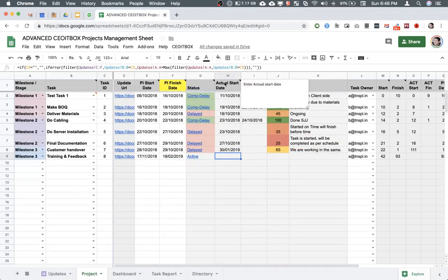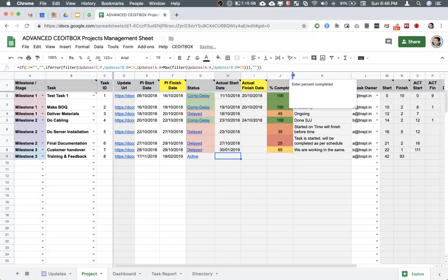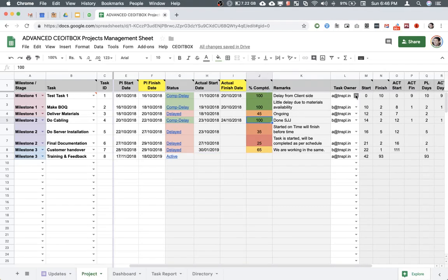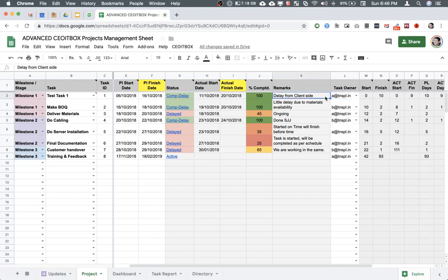The actual start date and actual finish date is not to be entered manually. This will be taken from the person who has been assigned the task through a Google form. Same for the completion percentage. The person can indicate what percentage of the task has been completed. And you see here the remarks, these are the latest remarks entered by the owner of the task. Whoever is the owner of the task, his email ID can be selected from this drop-down against each task.